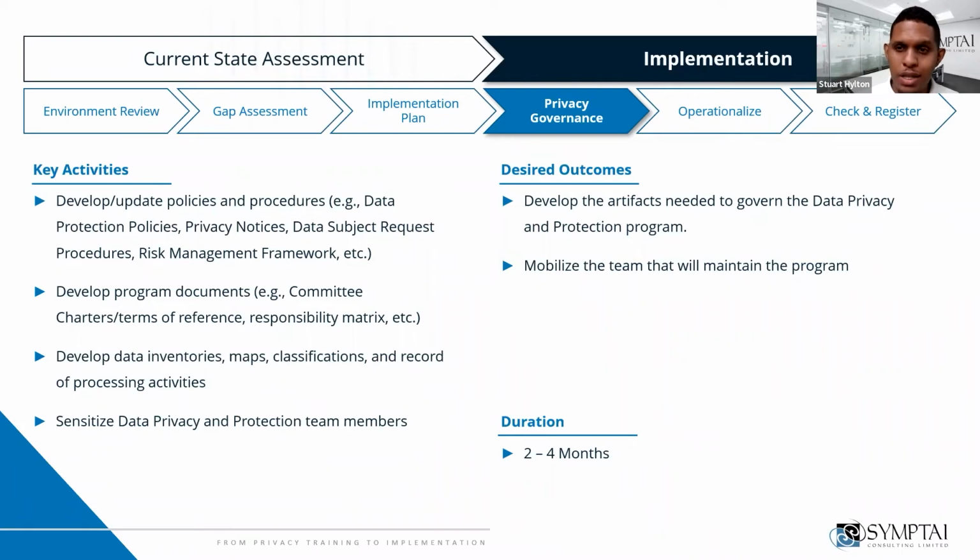And you want to do this early, of course, because we want to be able to communicate to the persons that we're bringing on board as part of this journey within the organization what is expected of them. A quick and easy way to do that is to develop a responsibility matrix that indicates, well, you need to be informed, this person is going to be accountable, this person needs to actually action the item.